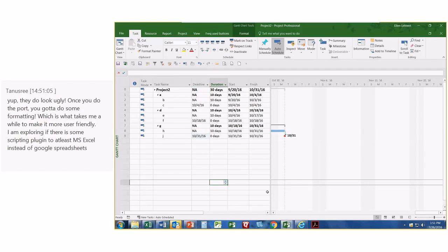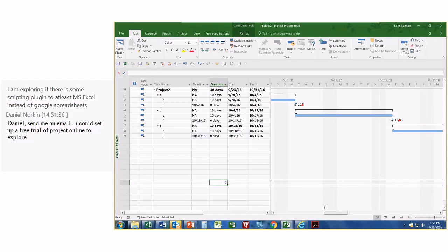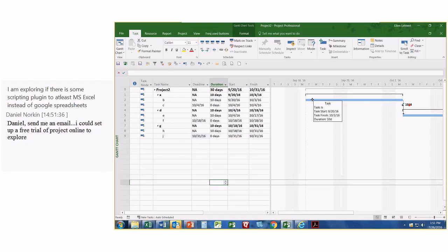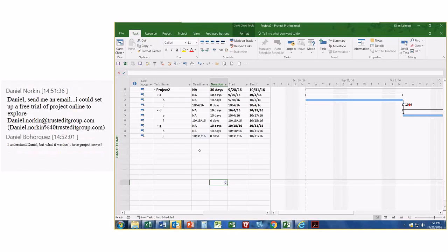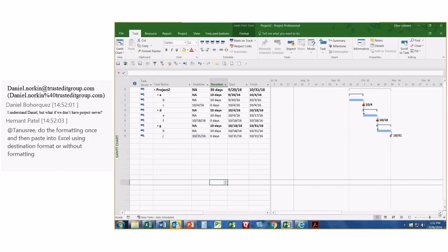There you go. Now, I know from looking at this project based on my deadlines, I have to start this no later than September, I don't know, probably 19th or 18th, something like that. But I want to start earlier, so I make sure that my tasks aren't going to be performed exactly as planned. I need to give myself some wiggle room, some slack in there. But the other part of this is when this is so up against deadline, you really can't manage this project very well because the end date will not go past Halloween.